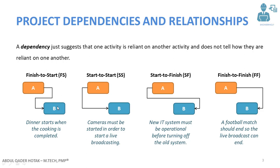As long as the cooking is not completed, you cannot start your dinner — cooking must be completed in order to start the dinner. The most common type of relationship used in project management today is Finish-to-Start. For Start-to-Start, the predecessor activity must be started in order for the successor activity to also be started.